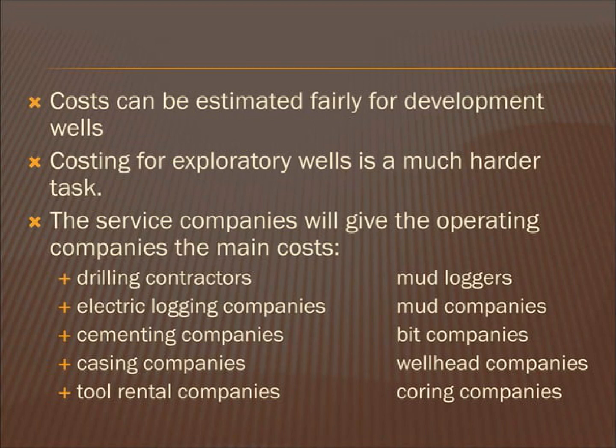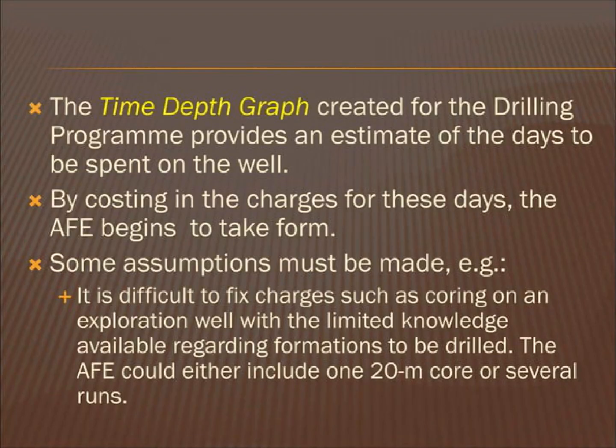Examples include drilling contractors, electric logging companies, cementing companies, casing companies, tool rental companies, mud loggers, mud companies, bit companies, wellhead companies and coring companies. The time depth graph created for the drilling program provides an estimate of the days to be spent on the well. By factoring in the charges associated with the estimated days, the AFE begins to take shape.